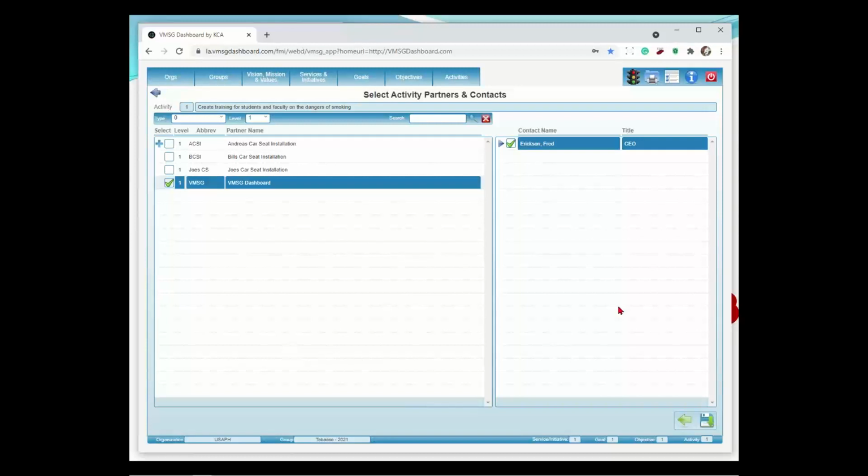So what you can do is bring your external partners involved, especially in things like your chip, where you're going to have a lot of external folks working with you. Instead of you having to call them, collect the information, and go back and put it in the system, it will email them. It'll give a link in the email to come right back into the system and update the particular activities they've been assigned.